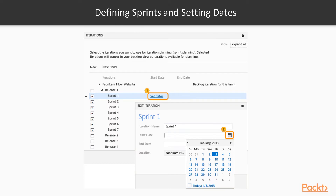Defining sprints and setting dates is really straightforward in TFS. You go into the web portal and have the ability to create new sprints and put dates around them. What's really nice is when you set a sprint date — say sprint one runs Monday to Friday, a one-week sprint — the next sprint you set up will automatically know you're doing one-week sprints and pre-populate the dates. It makes it quicker so you don't have to think about how many days to pick.